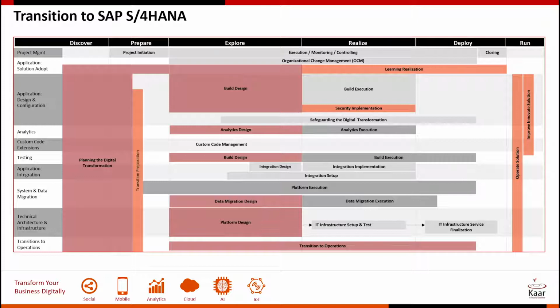Primarily, the steps involved are, we suggest, the cleanup of the unused custom code, the identification of the affected custom code in the productive use, the plan and execution of the necessary adjustment, and leveraging the full power of HANA by optimizing the code. Also trying to understand how you can use the S4HANA key user extensibility tools and the SAP Cloud Platform for extensions for those functionality that you want to customize S4HANA for.